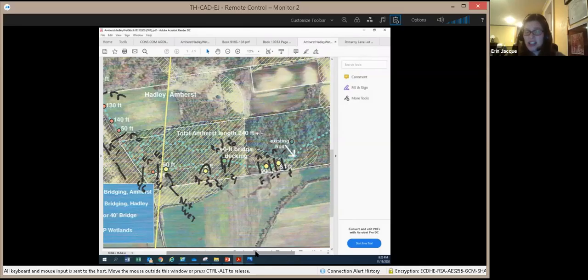And then we can actually get into more nitty gritty as far as the footprints of alteration, because on the original NOI application, it was noted that there was BVW alteration, but there was no quantifiable square footage, cubic footage of wetland impact. What this would allow us to do is quantify that so that we could revise the form and actually include what the modification would be, and address some of the additional comments. But I think it's a great start, and I don't think we have to really change the project. I think the project can stay as is.